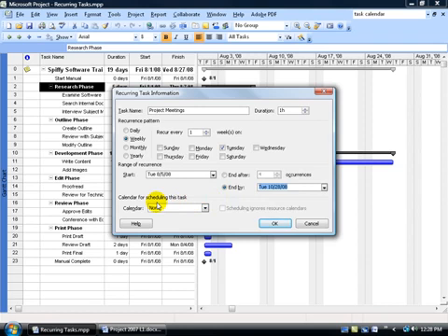Because our focus here was, do we want to go ahead and leave this alone? Just say we're happy with this being connected by default to the project calendar, then leave it as none. If you're not sure, you can of course always say Dreamforce, but that's saying the same thing. If we leave it as none, it'll still go off the project calendar. If we assign it Dreamforce, which is assigned to the project calendar, it's the same thing.